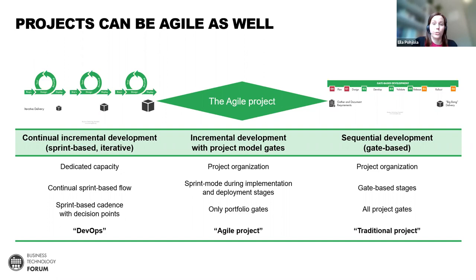So you can still go through the gate-based approach, with the project organization, but you do your development phase, for instance, in a sprint mode and use only the high-level gates. This is one of the aspects of that flexibility that PT standard offers, that you also have the opportunity to do agile projects.